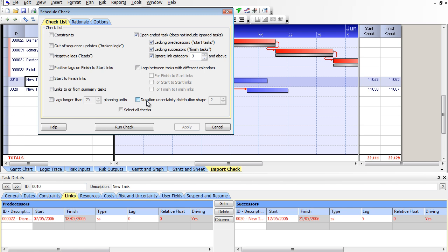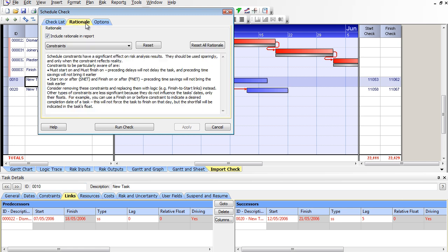So if I got a duration like that, I would say, well, how could a 6-day duration turn into 30 days? Oh, well, we've got a permit issue. Oh, so you're telling me there's not that much uncertainty. There's actually some uncertainty, but there's a risk event. Well, what's the chance that we have a problem with that permit? And then I can pull that risk event off, and maybe it's a 5 to 7 day uncertainty with a 20-day risk event, or whatever the case may be.